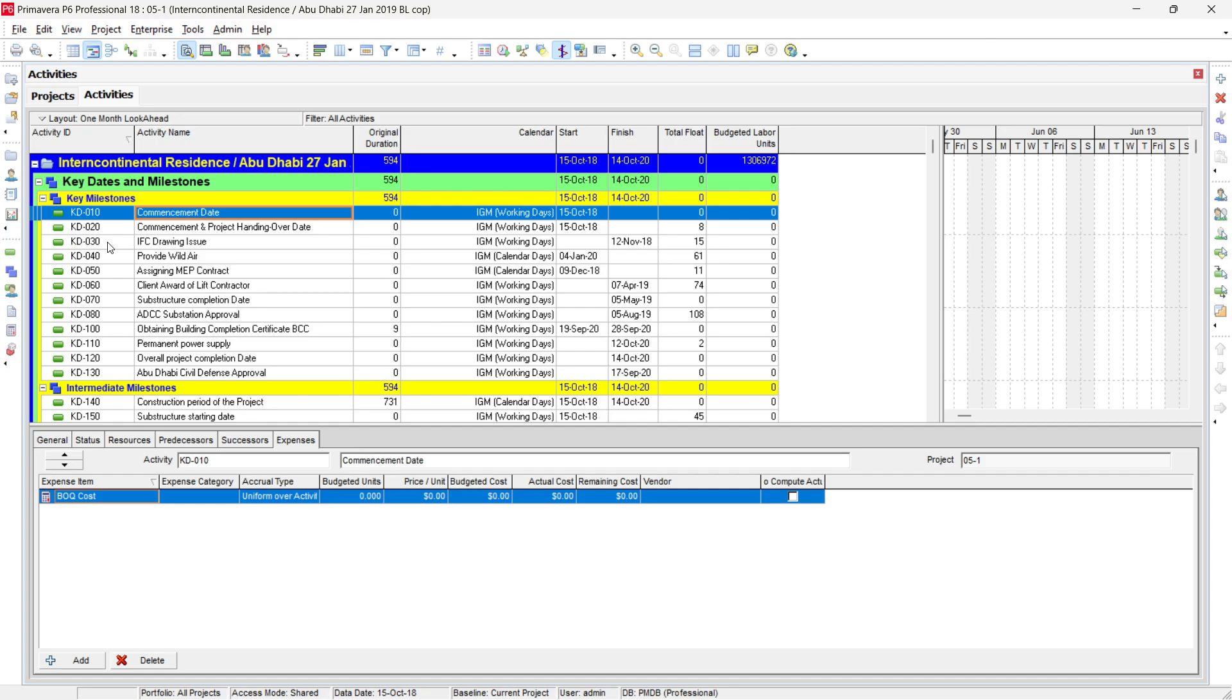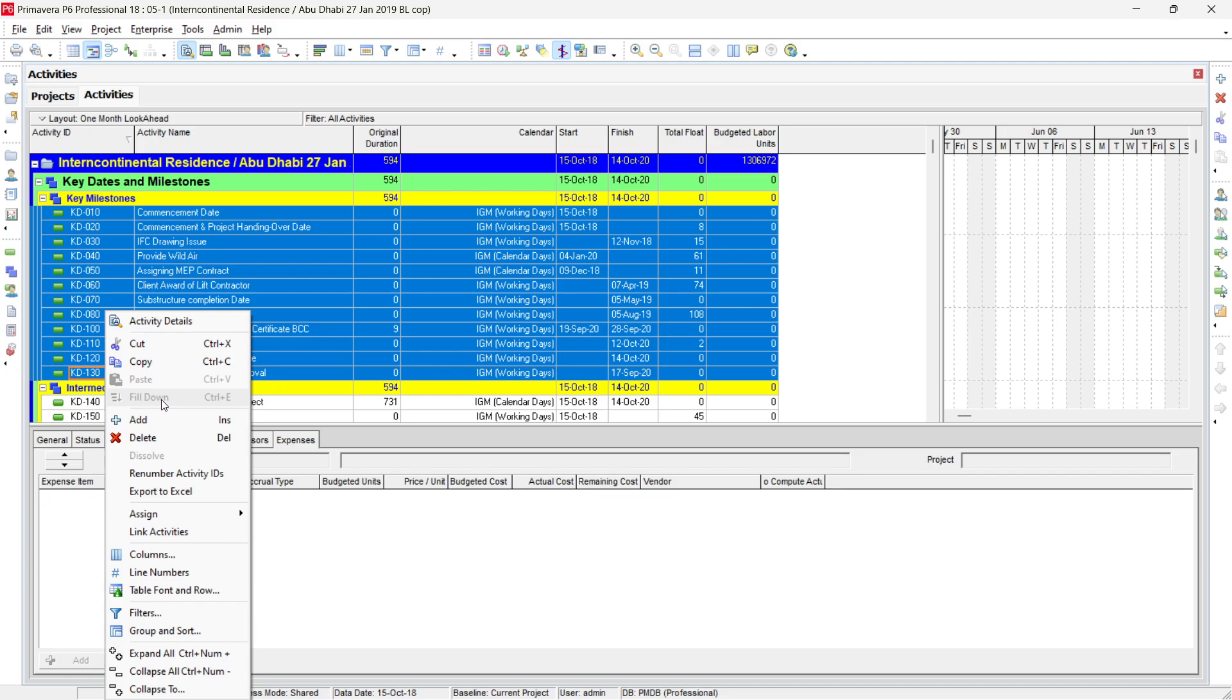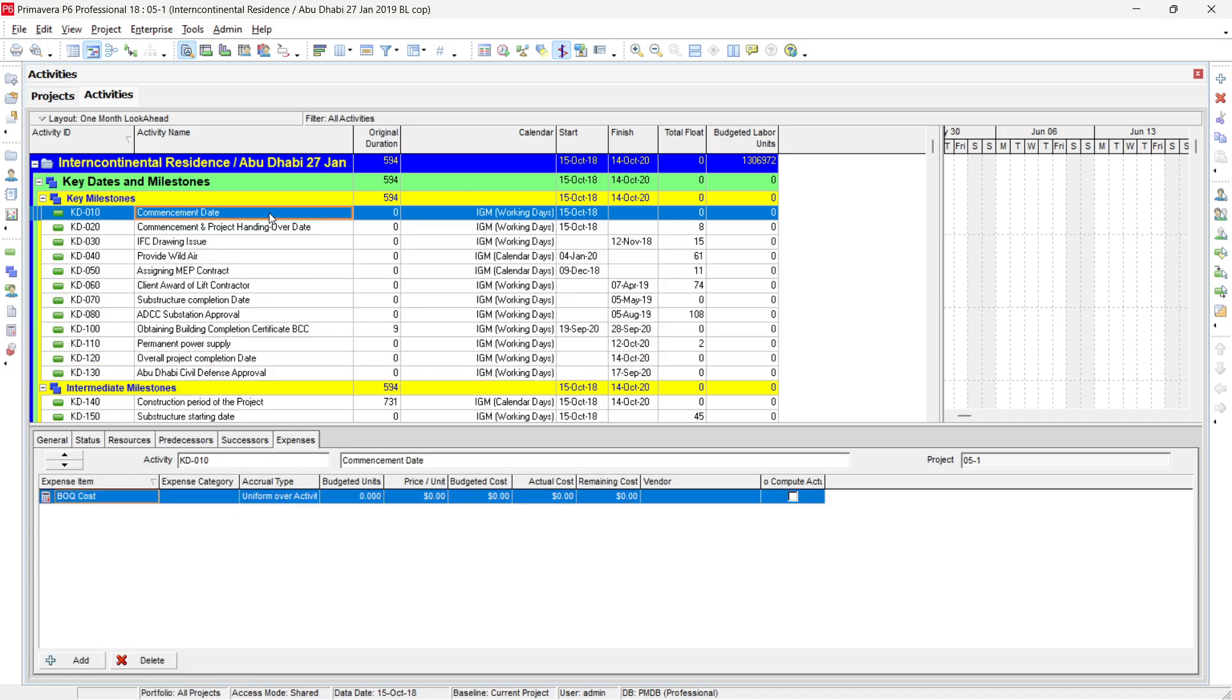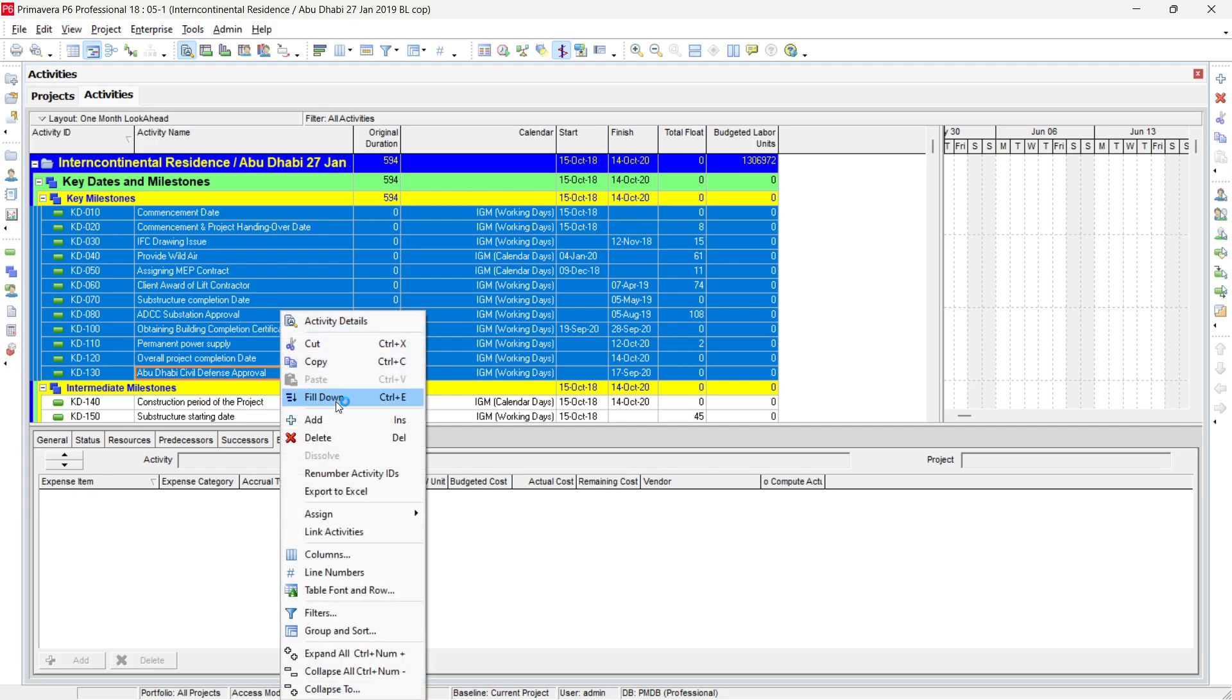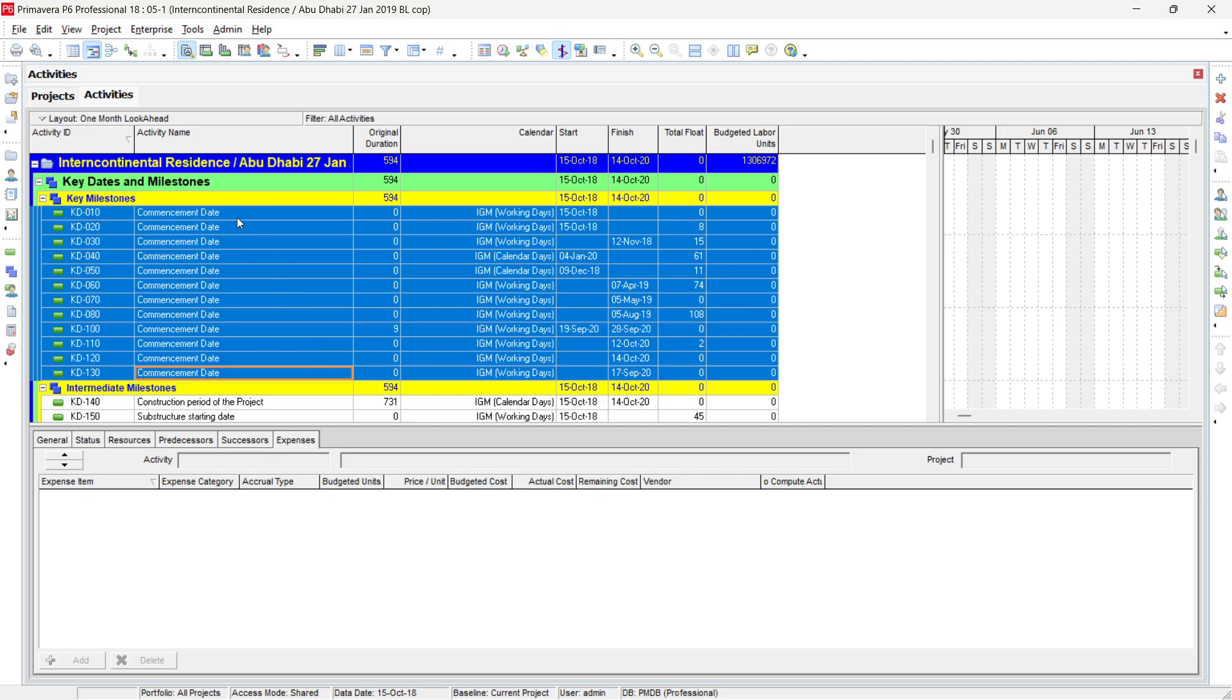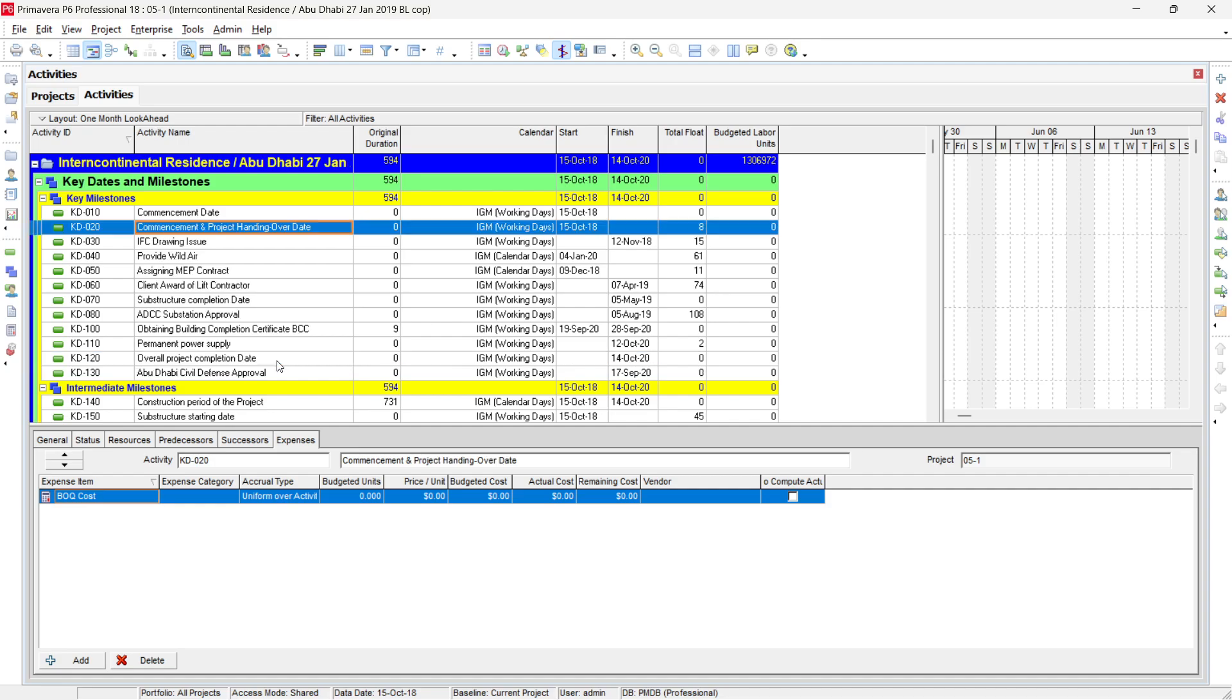So if you select first Activity ID and then press shift and the last Activity ID, and if I press right button, you can see that this fill down option is not available here. So the fill down option is not working on the Activity ID. Similarly, if I go in Activity name and select my last Activity where we want to make the changes, just press shift and this button. Then if you select the right click, you can see fill down is available here. So if you select fill down button, you can see that all the information Activity name changes. Thank you Primavera for the Ctrl Z undo button. So I just press Ctrl Z to bring it back.